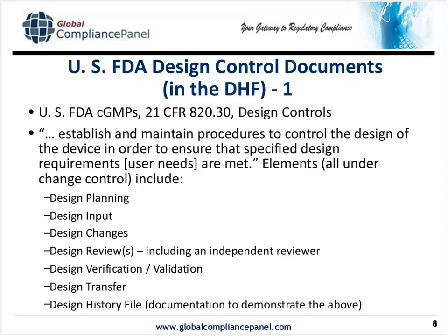I prefer closing it out at the point of design transfer, and then I prefer either reopening it, which I don't recommend, or adding addendums to it if there's major changes. If there's minor changes, just handle all of that under the change control, not the design change control system, but the change control system that is used throughout your company for GMP compliance. But again, that's my personal preference.